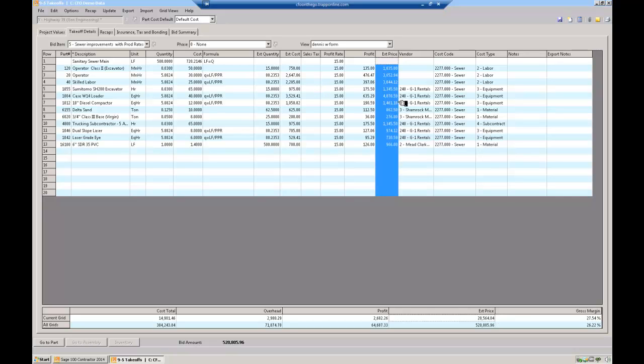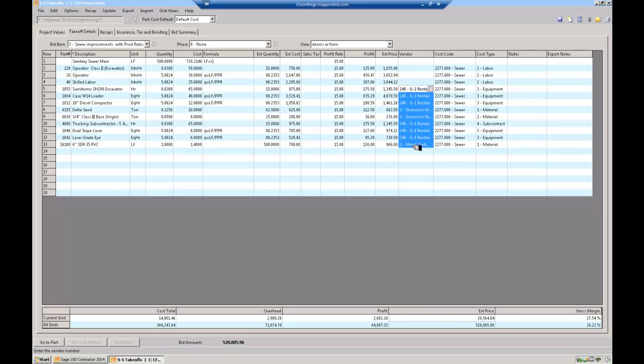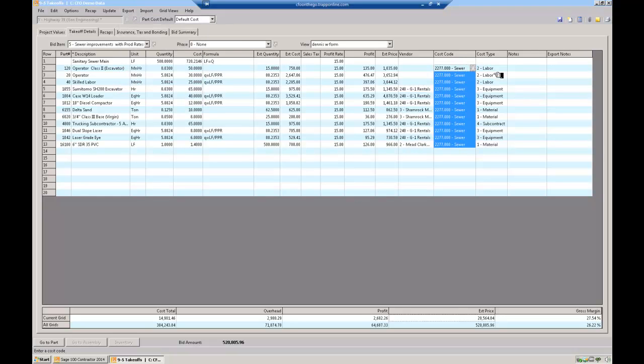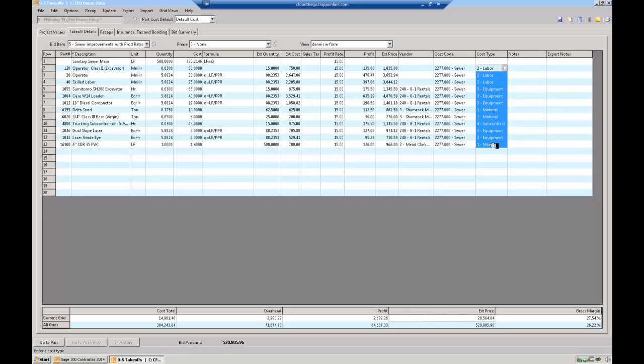The reason for doing it in here, and you can continue to do it in Excel if that's what you want to do, and we can just copy and paste in the budget. But once I identify these items as being the vendors that I wanted to use, I have the ability to automatically create, whether it be a purchase order or a subcontract, once we get this job awarded. So all of those things that you do afterwards become automatic and done via mouse clicks rather than manual effort in front of Word or something like that. Anyway, that's that. This would give me the budget for these cost codes, whether it's labor, equipment. That feeds right into the accounting budget. So that's what we would balance our actuals against.